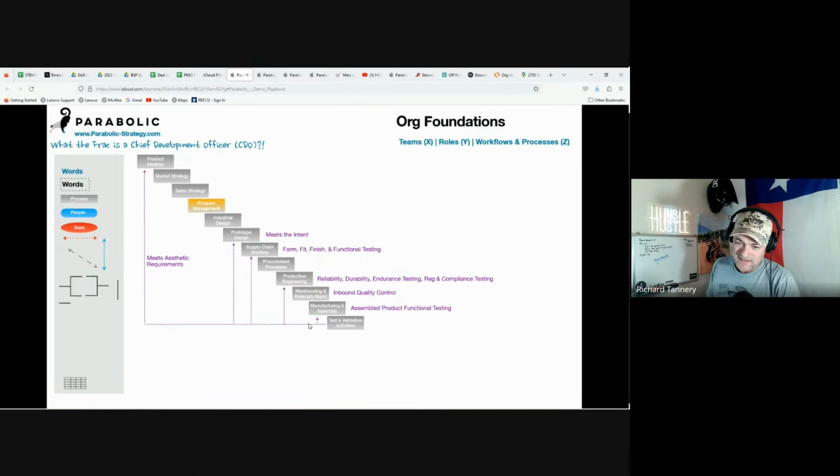Then we've, of course, got to test and validate all of these products, and that could be test and validation back along all of the phase gates of the vehicle as it's gone from prototyping to engineering validation to design validation to production validation. And now we've got short run assembly on the line.